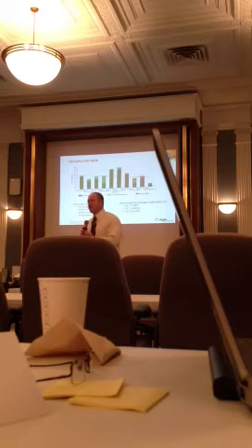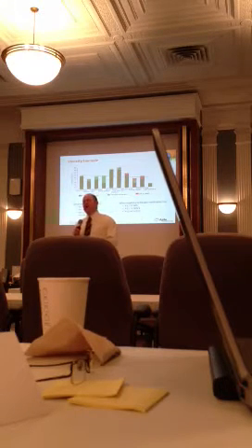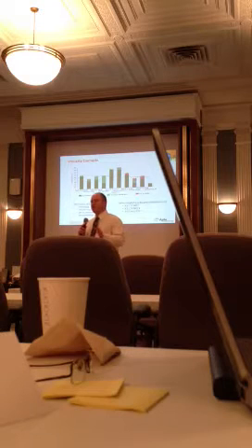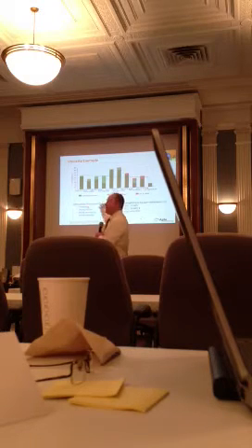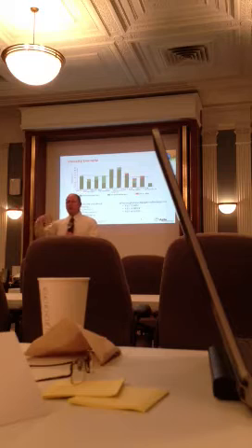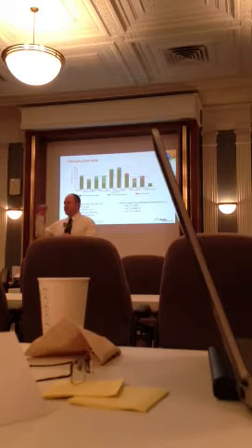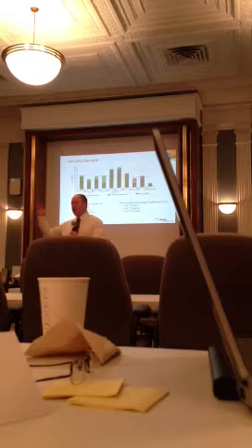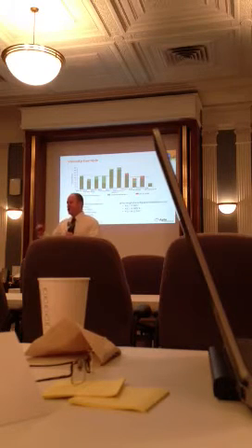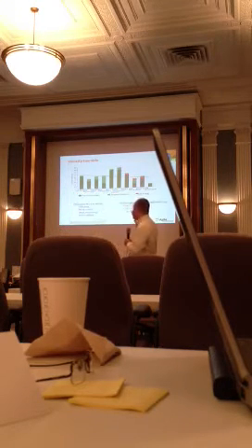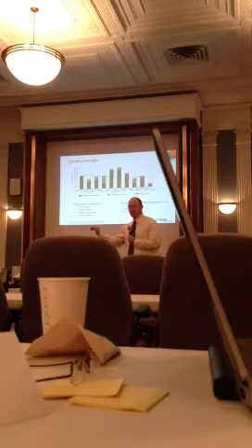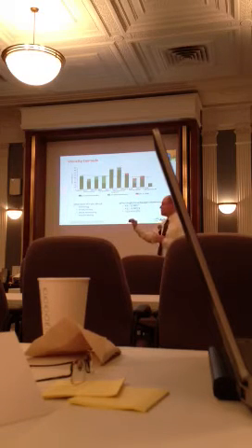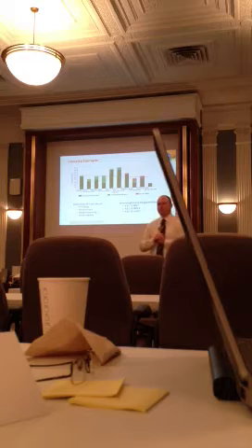So this is a little bit of a trickier question. Now this is real life. So it's not just black and white where I say, oh, well, we got acceptance on 60 story points last time, so I'm only going to let you commit to 60. You're trying to get to the right number as a team. You want to be right. You don't want to be high and you don't want to be low. You want to be right. So I let my team commit to 100 story points the next iteration. What does that tell us about the 20 story points that are carrying over?